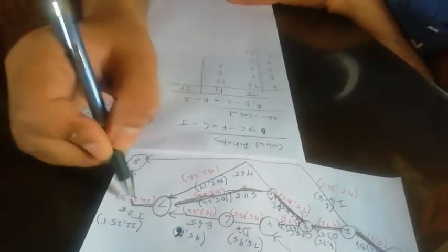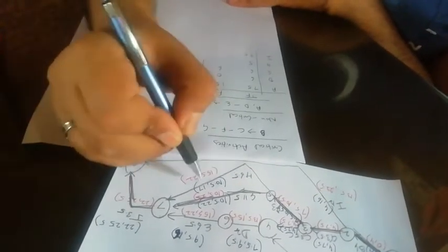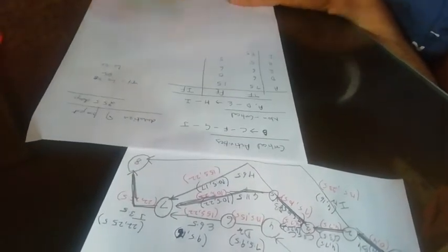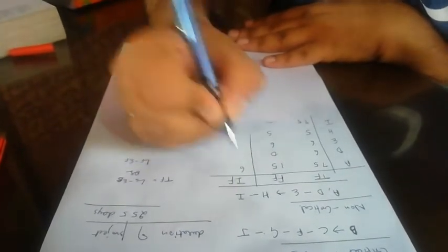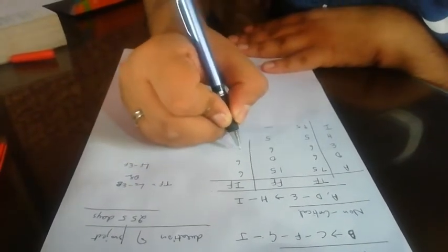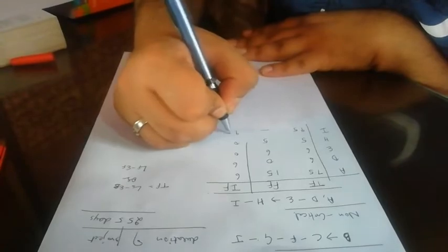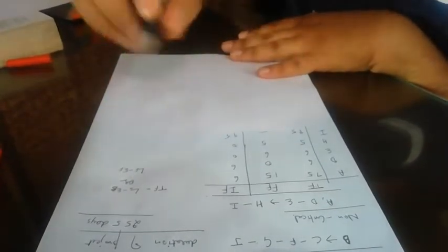For H, the next activity to H is J. So 22 minus 17, 5. And I, the next activity for I is the last activity, so it is not having any free float in this. And independent float is the total minus free: 7.5 minus 1.5, 6 minus 0, 6, 0, 0 and 9.5. So this becomes the floats for each non-critical activity.